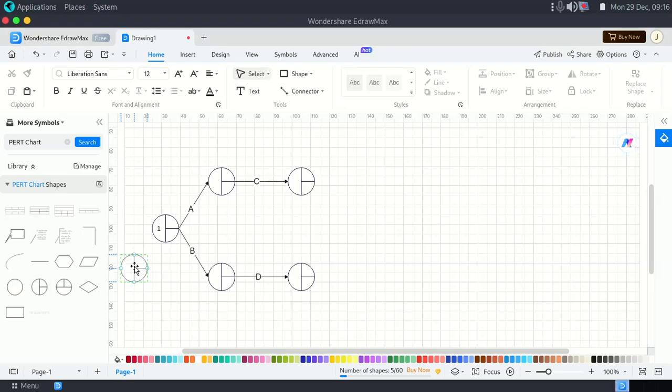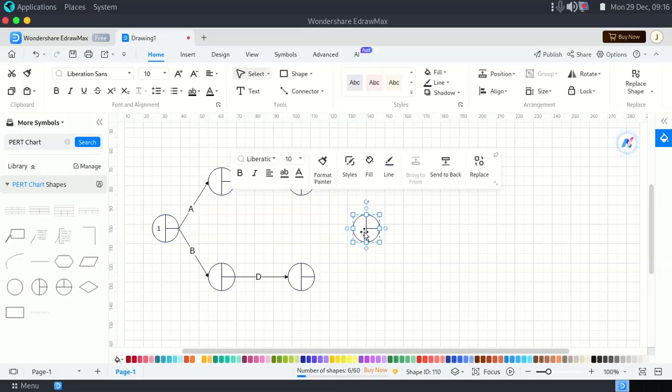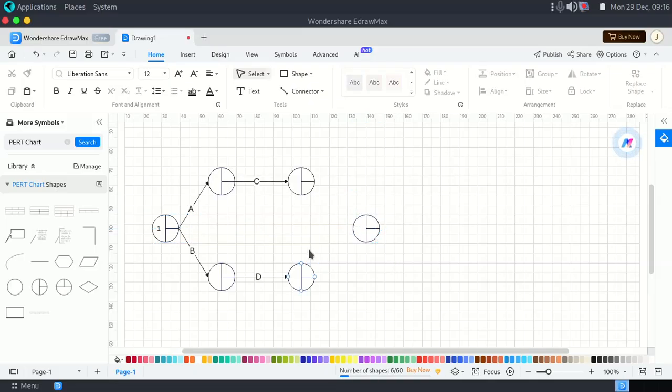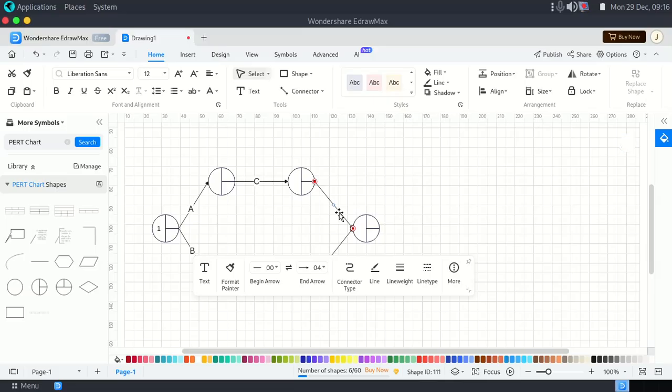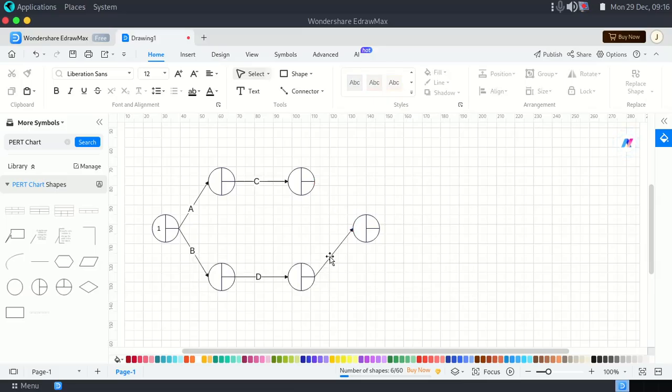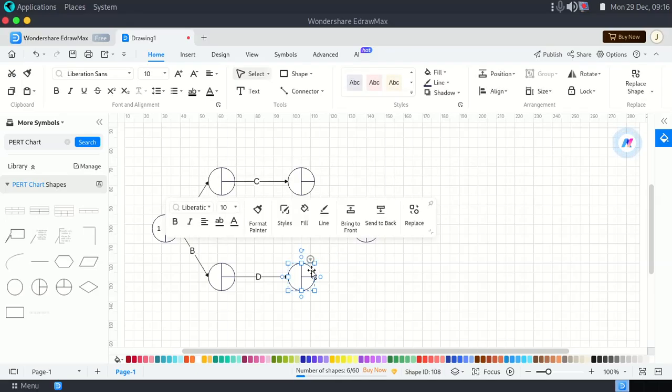So here we are simply saying that we must have a node which is E. Now we are saying E is coming from both C and D. So we don't want to create lines, for example, we don't want to do this, whereby we have a situation like this, because we would ask, what is this node? We only want E. So in this case, what we are going to do is merge these particular nodes.